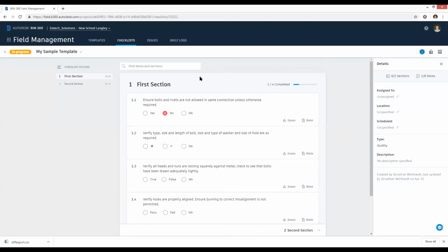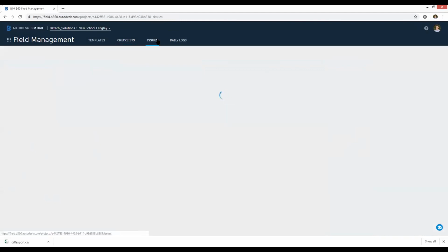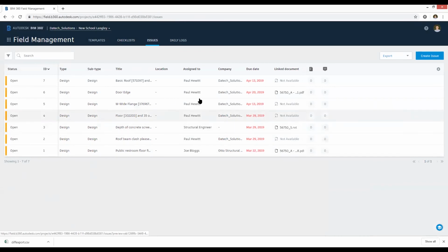And you can imagine these checklists become quite efficient to use, that you have this on your iPad or on your mobile device being used by your subcontractor or being used by the architect or the designer on site, and anything that's entered on the iPad all feeds back into BIM360 automatically, and then you can review all of these in your issue logs, what conforms, what doesn't conform, how many outstanding issues there are, and again export this as a report as well.